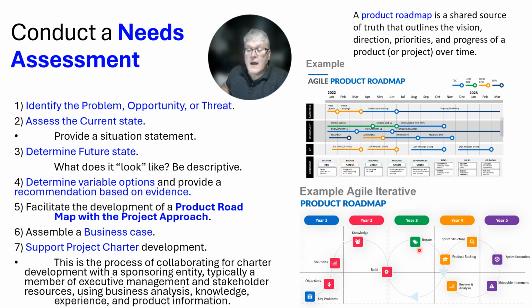And then this is saying iterate. So this may be you have to do something over and over and over again to get it right, whatever issue you're addressing. Okay, and then you address a product backlog. A product backlog we're going to talk about later on, but a product backlog is part of doing the iterative process, and it's just identifying individual tasks or activities that need to be accomplished to get done with a certain phase or a certain iteration. And we'll talk about that later on.